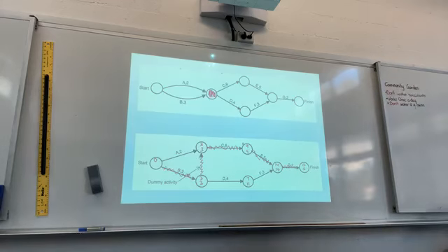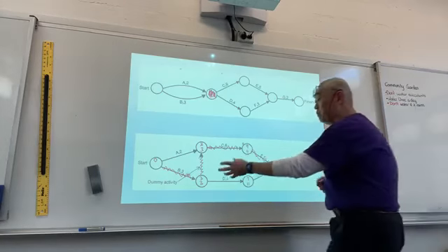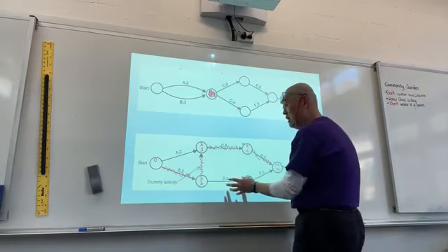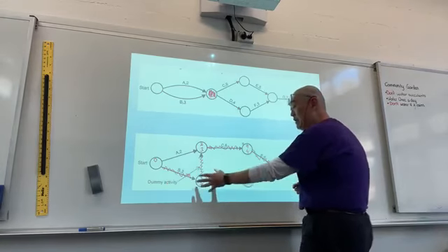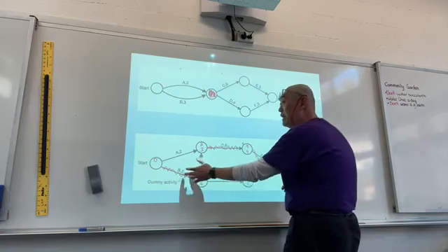Alright, make sure that you know what a dummy activity is. It does not have any duration. It's just used to indicate that B is an immediate predecessor for D.